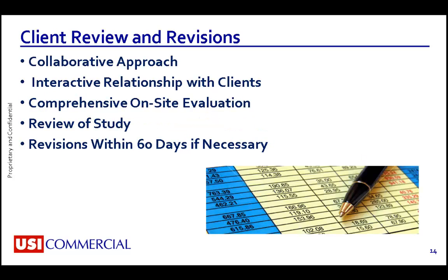The most successful studies are those which are done in a closely interactive relationship with the client and its management professionals. A comprehensive on-site evaluation by an experienced project manager and on-site reserve analyst will be conducted, and the resulting data compiled and analyzed. At that time, a preliminary report will be submitted to the client for review and comment. Based on the client's input, the report will be revised.